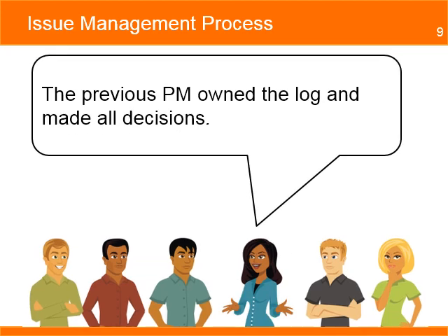They say that the project manager managed the log. Some of the issues were reported by the team and others by the project manager. Team members will report on issues that have the potential to impact the project, and then the project manager will ask questions to see if the issue is significant or not to register in the log. For most of the issues, he gave a solution and instructions on how to implement them.